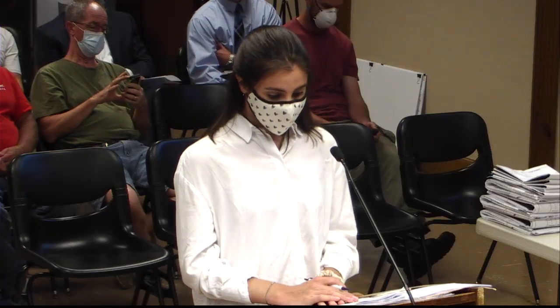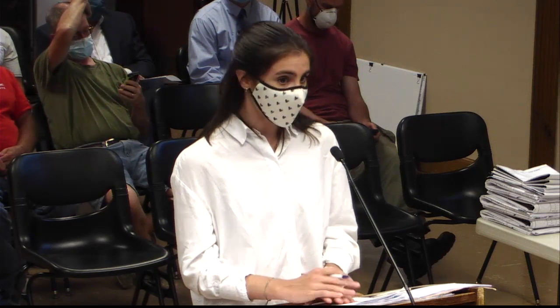All right. And when you say constraints on material, is it you're not able to get? Correct. So unfortunately, the actual factory that produces those modules has been shut down due to coronavirus outbreaks in the region for a couple of months now, and they have been unable to tell us when they will reopen. So unfortunately, we had to move to a different manufacturer. It's Vietnam.